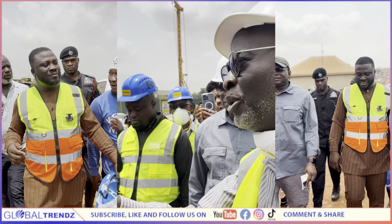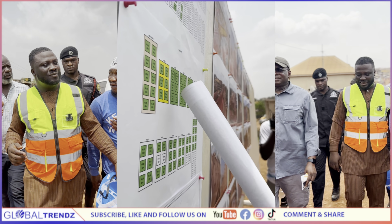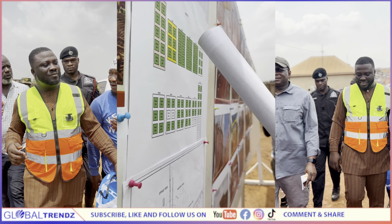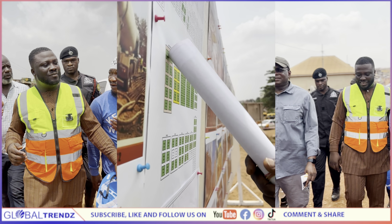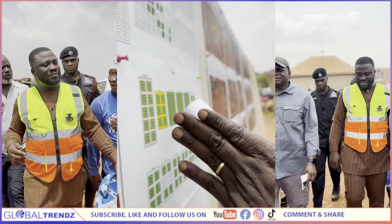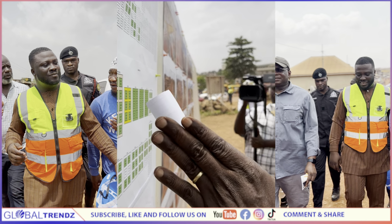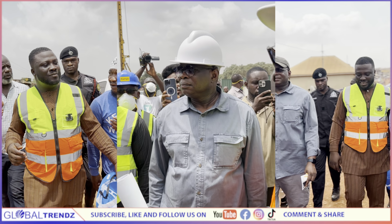When you look at the ones over here, it represents the park-up itself. They have done 3 of them. This one is in the process of being cast. They will soon cast this one because they finished all the reinforcement. And this one, they have done the blinding. When they have done all these things, this is work that can be completed within the next 2 weeks. So they will have done about 4 of the park-ups.